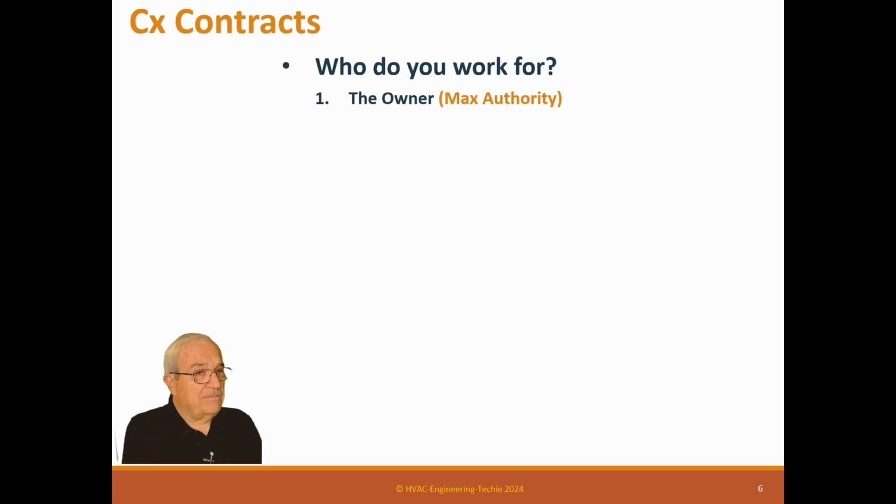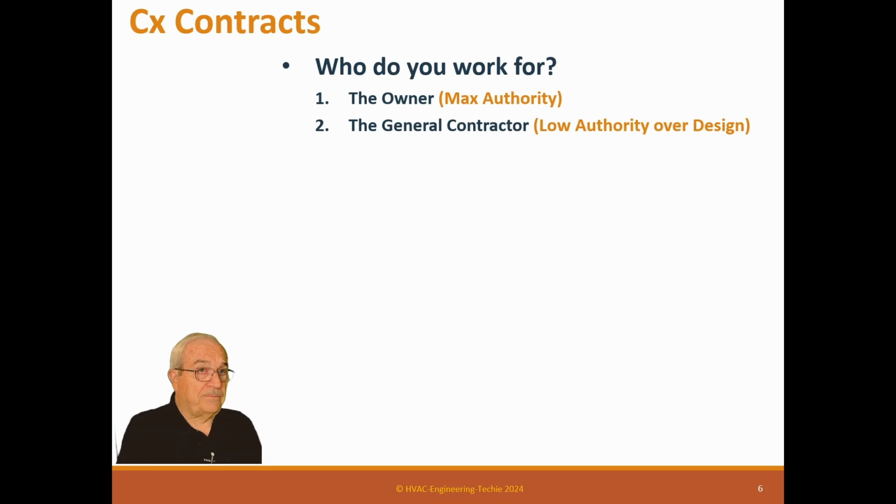The other thing that's important, as a commissioner, you have lots of responsibility but absolutely no authority. Nobody works for you on this project. So basically, the only authority you have is through who you're contracted to. And if you're contracted to the owner, he has all the authority. It's his project. So when you're contracted directly to him, you're at the right place. That's where you should be.